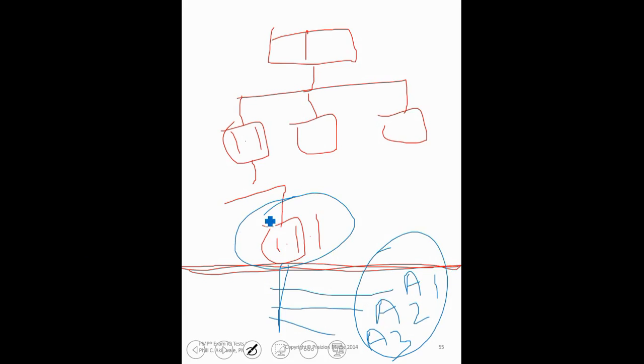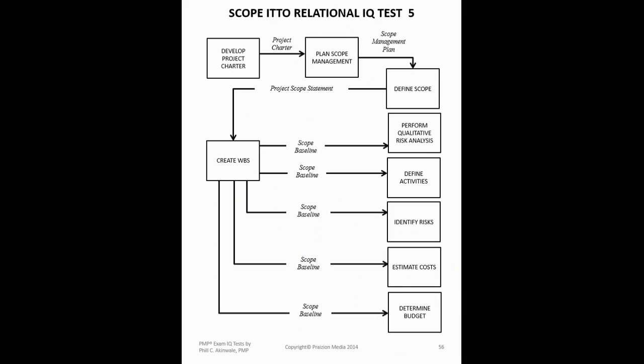Part of the WBS 1.1.1, not in the WBS A1, A2, A3. Those are too low level to be in the WBS. However, on this lower level, individuals can track their own work. At this higher level, PM tracks work, program manager may be involved, management may get into these weeds, but typically management would stay at a higher level, such as the control account level that we talked about in the previous tutorial.